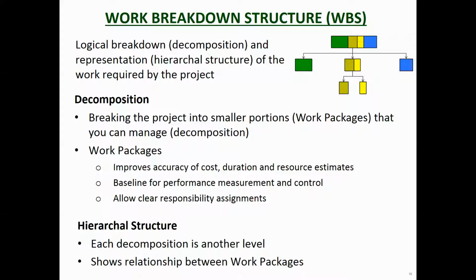And it also means that you can have clear responsibility assignments. So rather than having 6 foremen and saying, okay guys, go build the road, you say, okay Fred, you're responsible for building this curb and channel, here's your work package. Joe, you're responsible for building the subgrade, here's your work package. So it allows you to allocate responsibility and brief the right person on the project.